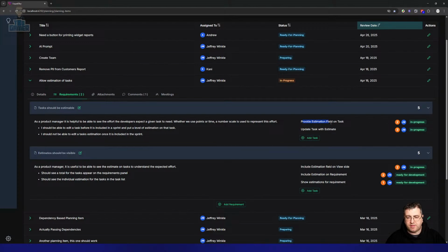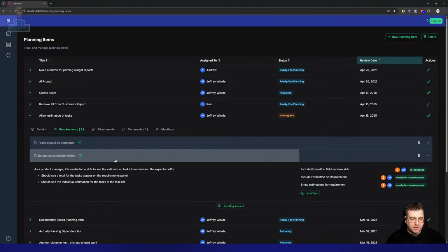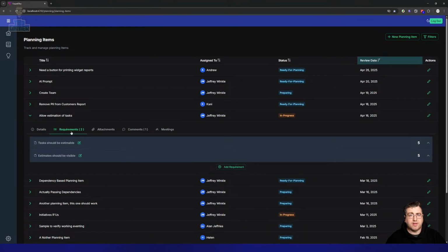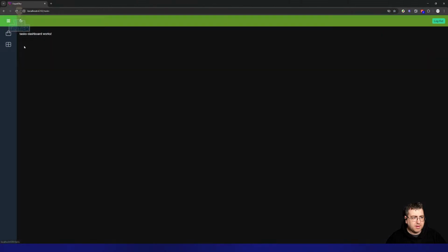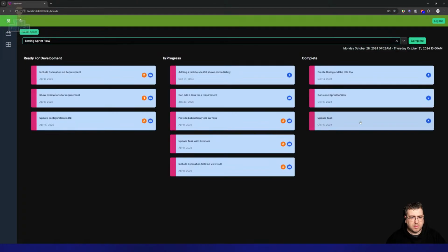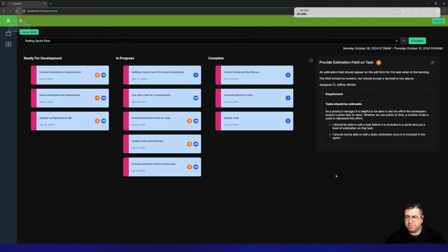But the expectation there is these tasks can be very small, right? They can be very manageable. They don't have to fit in the story. They're now taskable as, add a button on a screen. That can be a task. We know we can do that quickly. Add a database call. That can be quickly done. These estimates can come down in size. Yeah, so that's the concept. And right now I'm not dictating points versus time. You can put a number on there. But yeah, again, that's what it looks like when it's in flow.